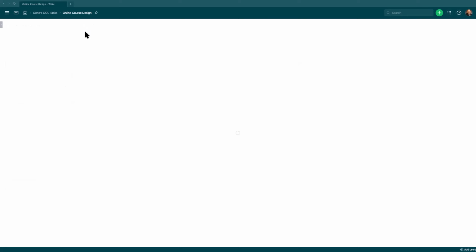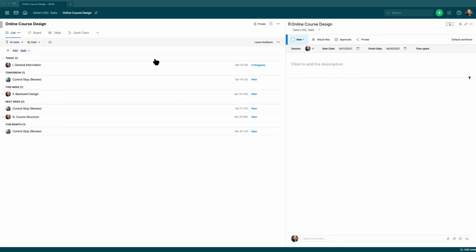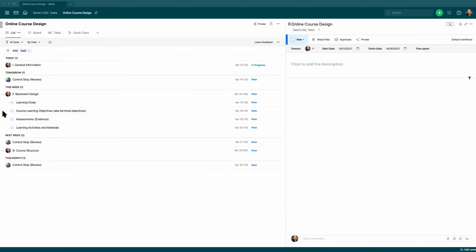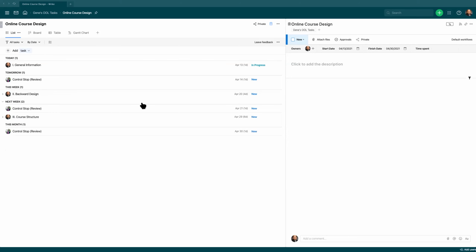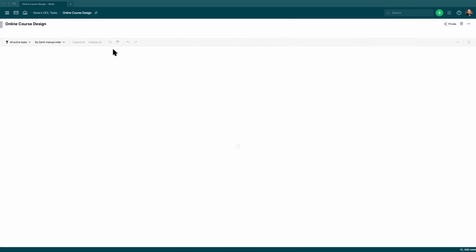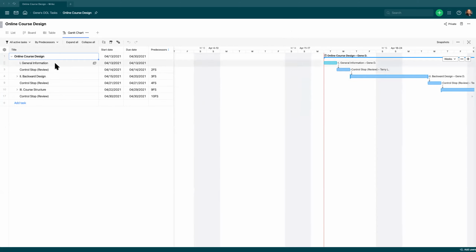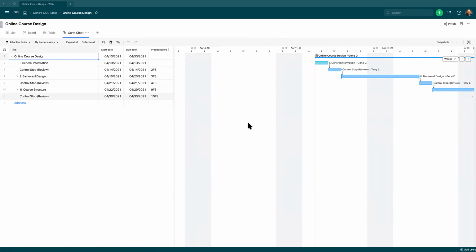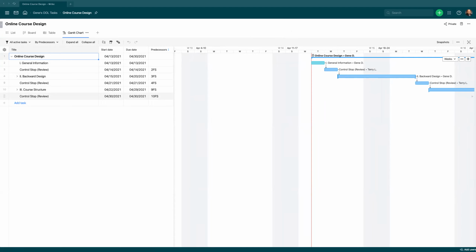And the last tool that you could use for a schedule is just a generic list, where you just list things straight down. Much like the spreadsheet or the table over here, I think I would rather have a table myself. But like I said, the key attributes that we want to keep in mind with a schedule is you have a task. Each task has a start date and due date. It's assigned to a certain person, and it also has durations.